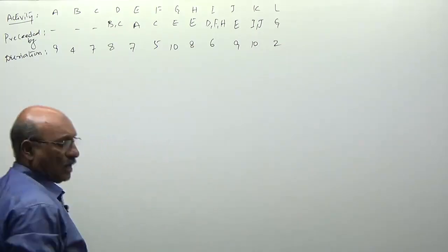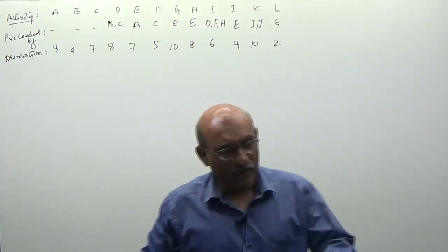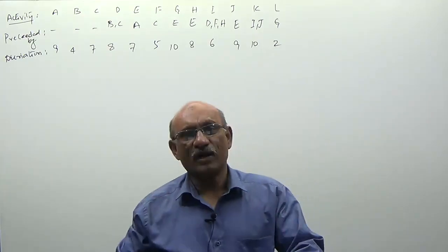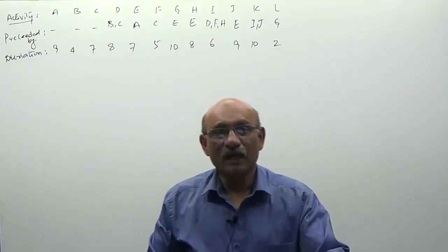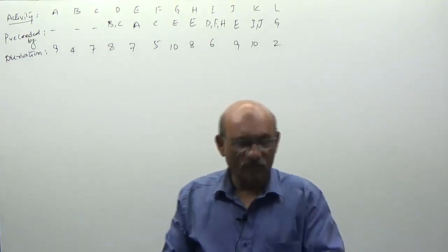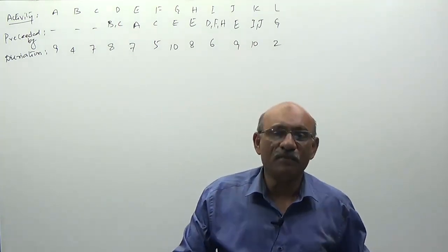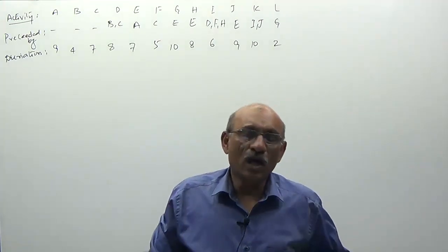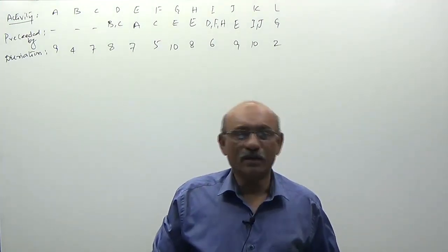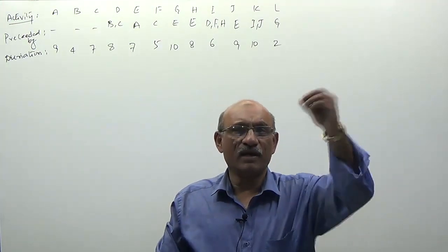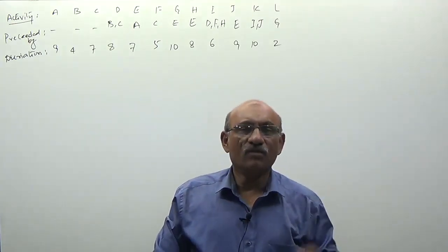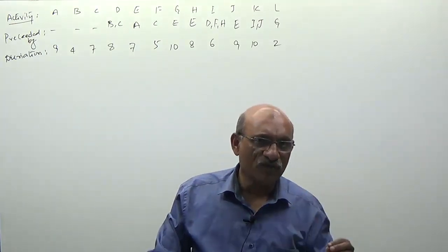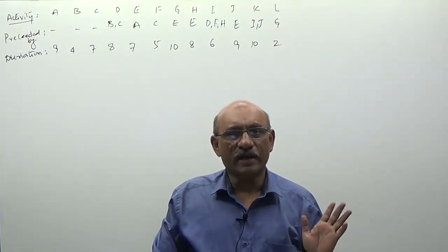Now, how to draw a network? Let us recollect the points one after another. A network or a project always starts with an independent activity or independent activities. What is meant by an independent activity? An activity which is not dependent on anyone. Otherwise, any activity which has no predecessor is called an independent activity.